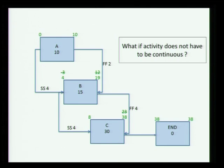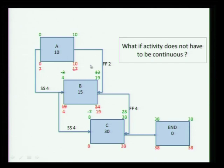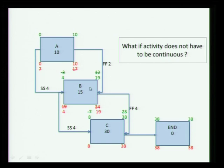Now we come to the question: what if an activity does not have to be continuous? This is very similar to our earlier example of excavation, laying pipe, and backfilling. You can see these values — with 0 to 10 representing the forward pass — and these values give the backward pass. Without getting into the detail: A starts at 0 and finishes at 10. B starts at 4 based on the start of A and goes all the way to 19. C starts at 8 based on the start of B and goes all the way to 38.